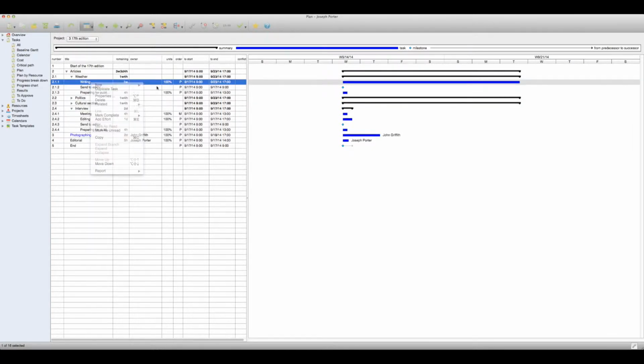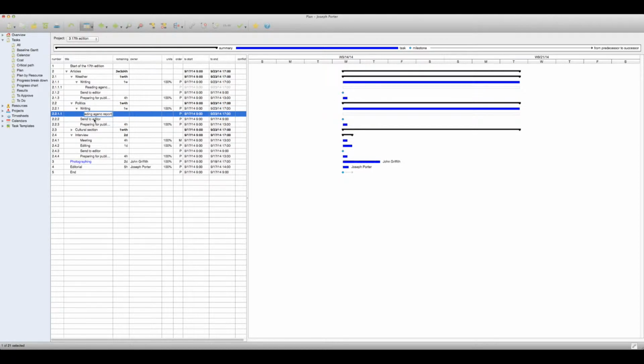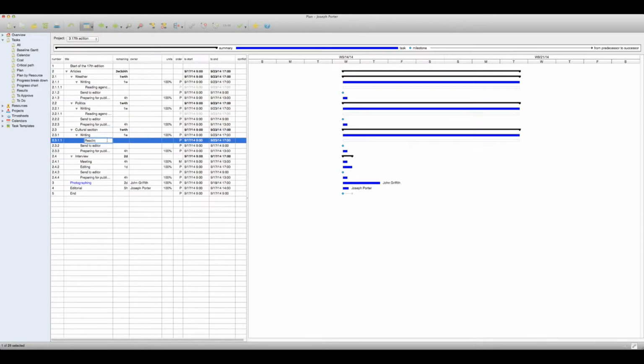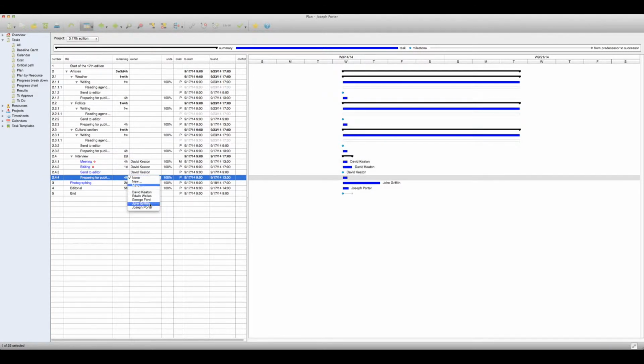If there is a subtask that inherits its plan from its parent, then the subtask will be represented by just a silhouette of a bar as long as the estimated duration of its parent. The name of the task owner is shown next to the taskbar in the chart.